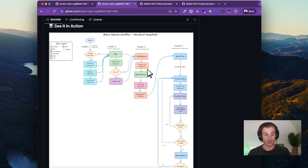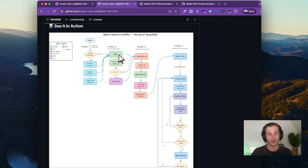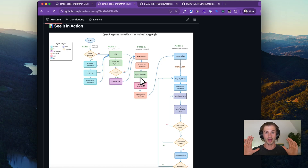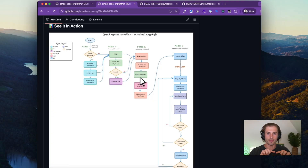Phase three is solutioning — building your architecture, database schema, and those critical foundational elements, which are really good to wireframe before developing a project. This phase also includes epics and stories. Your grand project idea gets broken down into epics — large bodies of work, like milestones. Within each epic are smaller tasks called stories, and within each story are bite-sized tasks — as small as adding a button, changing some text — which are easy to execute individually.